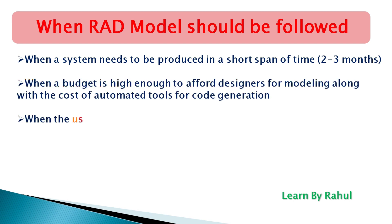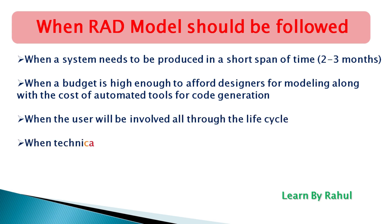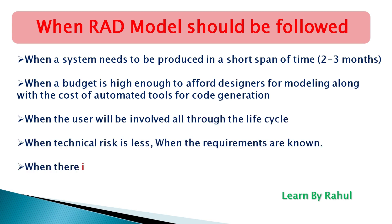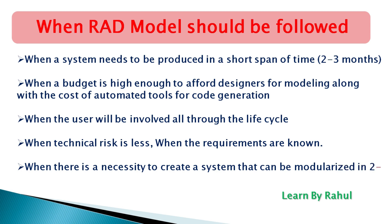Now let's talk about when the RAD model should be followed: when a system needs to be produced in a short span of time, like two or three months; when the budget is high enough to offer designers for modeling along with the cost of automated tools for code generation; when the user will be involved all through the life cycle; when the technical risk is less; when requirements are known; and when it is necessary to create a system that can be modularized in two to four months.